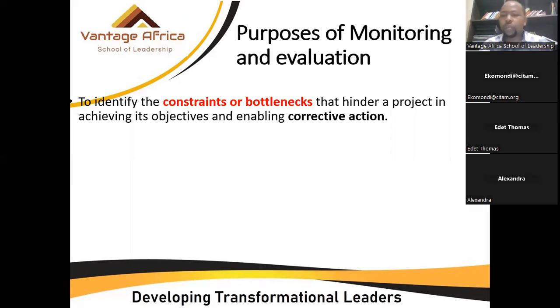One of the things that we are going to be looking at in M&E reporting, because that's one of the topics that we are going to give a lot of emphasis, is that once you report on the figures and on the results, there is something called program notes. Program notes are contextual issues. You're giving the context within which these results should be interpreted so that if somebody reads those results, they know that there is something behind.